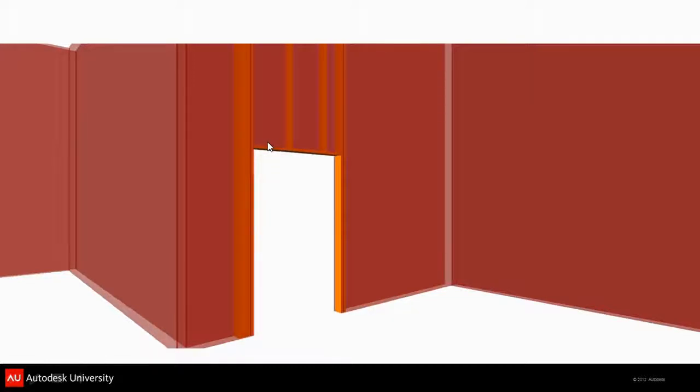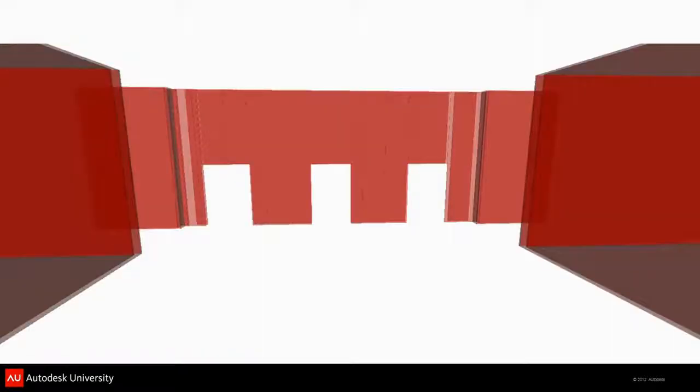If someone's asking you to model plumbing content to a higher level of development, your first question is, well, are you getting everyone else's models at a comparable level? Because it doesn't do me any good to model all of my plumbing to a high level of development if everyone else is not doing it in a comparable fashion. There needs to be parity to do this process.